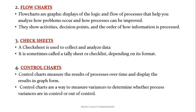The fourth is the control chart. In a control chart, there is a central line called the mean or goal, which is surrounded by another line called the limit — these are the upper limit and lower limit. These lines are again surrounded by two other lines known as the upper specification limit and lower specification limit. These upper and lower specification limits are provided in the contract and you cannot cross them — this is your final limit.